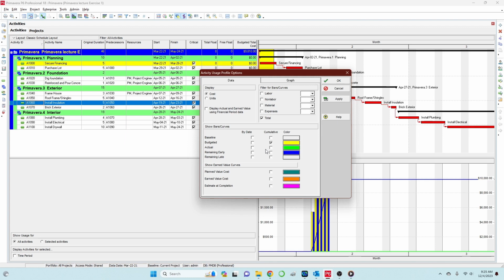But as I've told you, the cumulative production curve allows the project manager to monitor. You could compare whatever budget you initiated at the beginning to your actual for your project. And as a project manager, it shows you where your project status is. If at any given point in time your plotted points are above the curve, that gives you a warning as a project manager to investigate what's going on, whether you're going over budget, or you're going ahead of schedule while you're spending too much at that particular point in time.